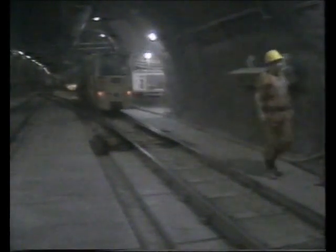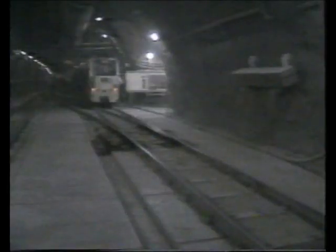This railway was built to a gauge of 900 millimetres. There were double tracks in each of the 3 tunnels, but to complicate matters, trains were often stopped at work sites along the way. There were crossovers at 375-metre intervals, so that through trains could be juggled past those which were stationary. Up to 700 workers were employed on the railway, with a further 300 engaged on maintenance.